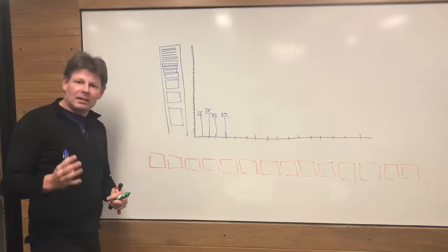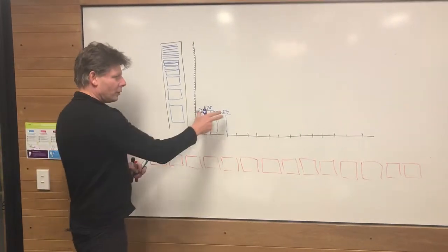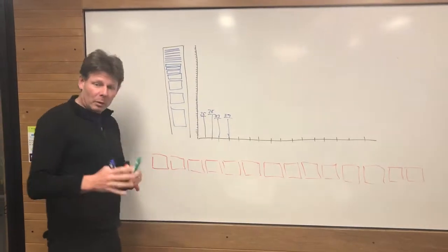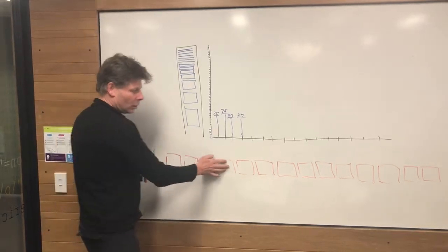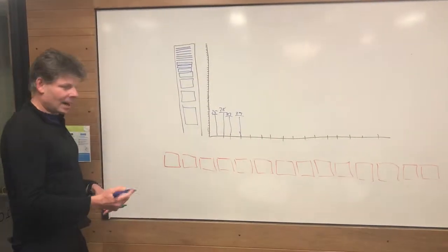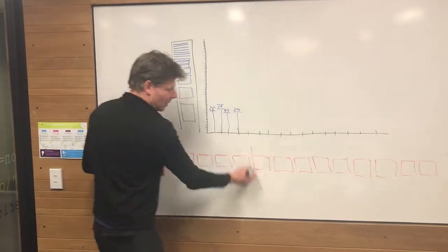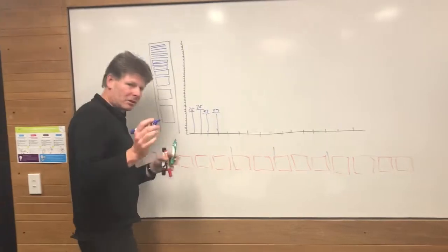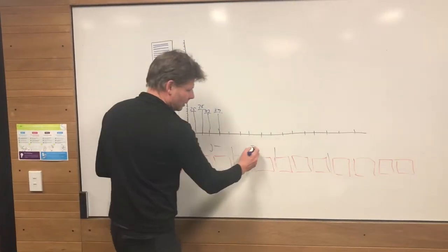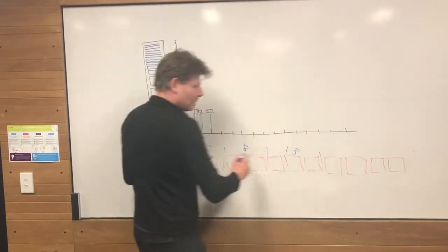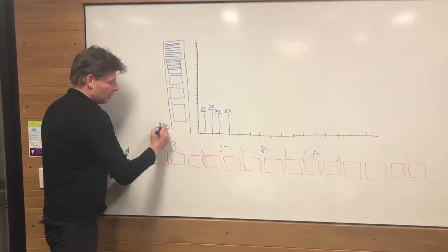First thing is called affinity estimating. Now, I believe that it's best to do affinity estimating once you're familiar with what these numbers are. And what we did, we only spent half an hour. The whole team got together. We lined up all of the pieces of work, all of the user stories, and we went through it. For a future Agile Nudge, I'll explain exactly how to do it. But then we segregated them all out and arbitrarily put where the boundaries were. We put, say, this was a 3, these were 5s, 8s, 13s. And we found out that the whole backlog was exactly 1,000 points.